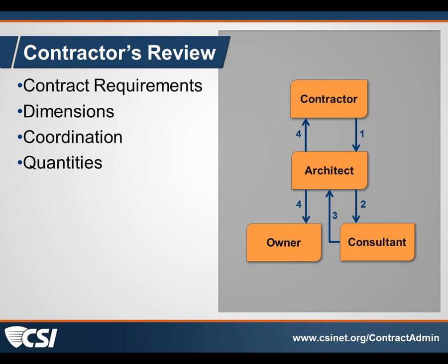We have a consultant. We may have a state agency like Department of Labor or Department of Insurance that might need to take a look at a certain package. And it jumps back to the submittal schedule and how important that is at the beginning of the job, so that everyone understands that that's a piece of the time frame that needs to be accounted for.